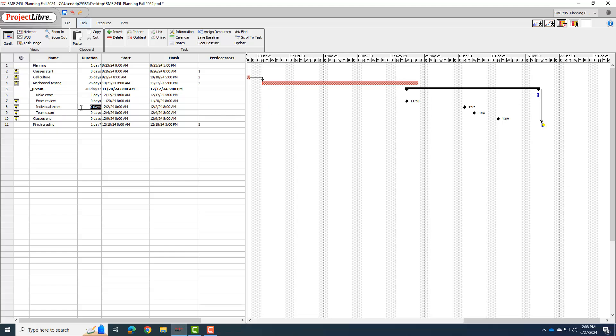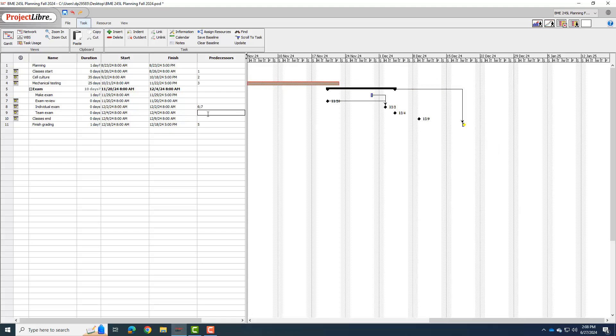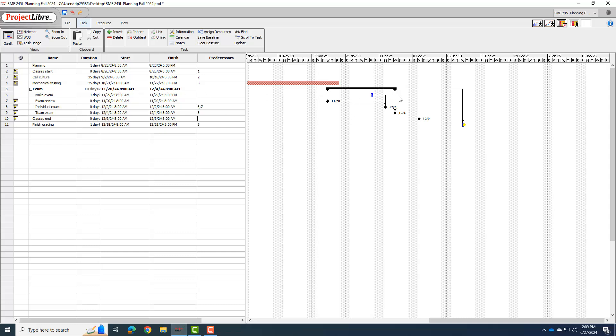So the individual exam can't happen until I make the exam. So one of the predecessors is going to be row six. And I'm not going to give you the individual exam before the exam review, so I'm going to set that predecessor as well. And then, of course, we're not going to have the team exam until after the individual exam. So I'm going to set that there as well. I can have the exam review before I make the exam. But now you can see how it has scheduled it, where it has now moved the make exam to before the individual exam. And again, we have this black bar indicating the exam phase, which encompasses all these other phases. So that's why I didn't need to set the exact dates on the exam phase, because Project Libre did it for itself.